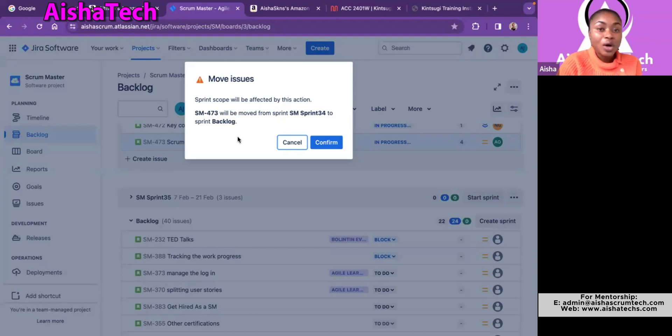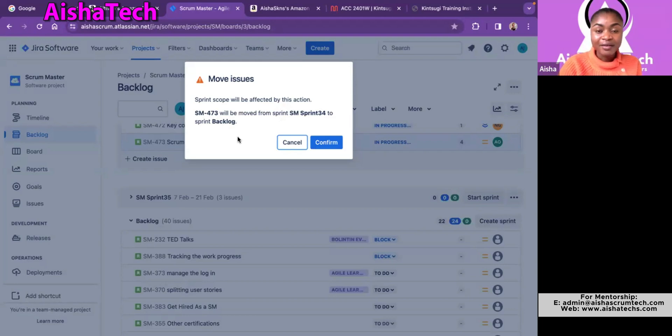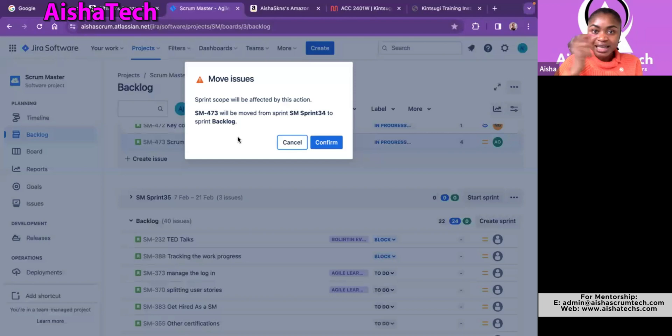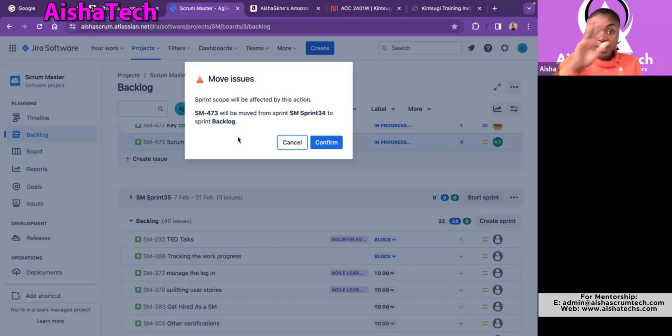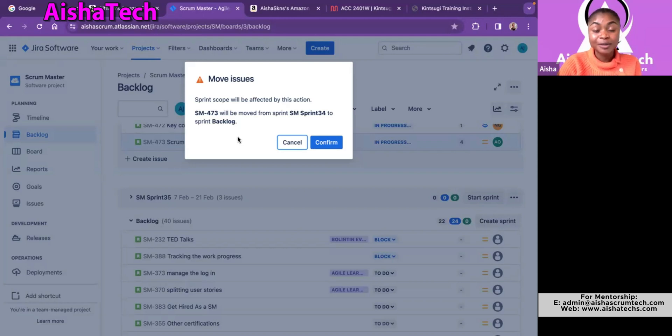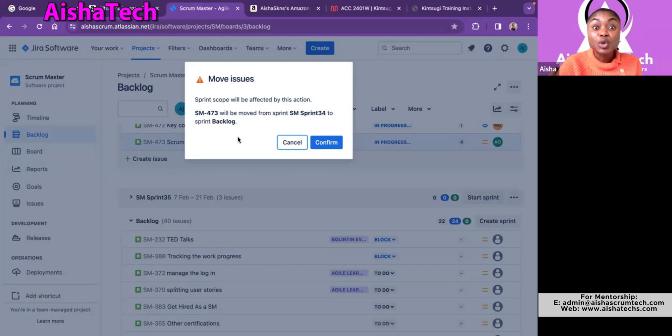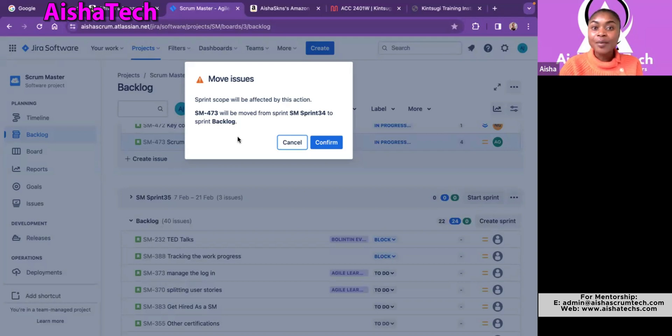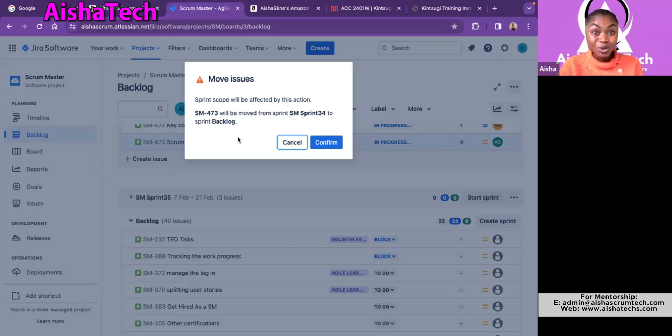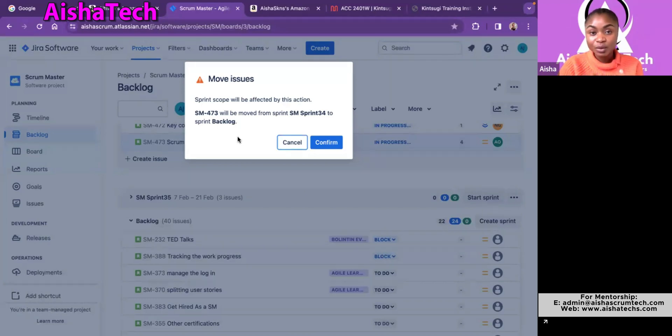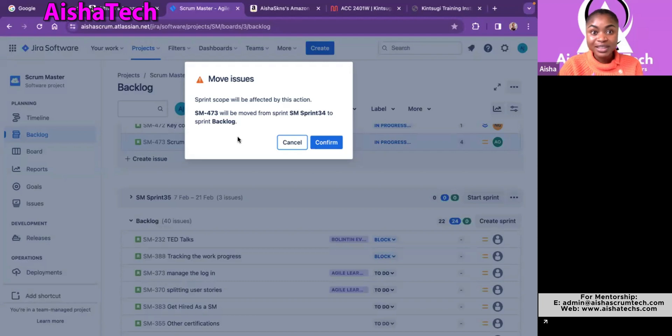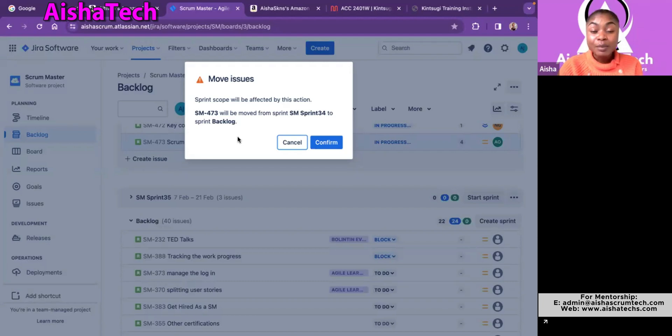Jira going to warn you that you are doing something that's anti-agile. Basically, it's not a good practice. So it says sprint scope will be affected by this action. Jira will give the warning. So this story will be moved to this sprint, to the sprint backlog. That's what I selected. And you will have to confirm as a scrum master. And it's a very good practice for you to coach the team. I'm saying this because I know teams sometimes do not know that if they pull things in and out of the active sprint, it will affect the overall sprint report. It also will affect the sprint. And also it will affect the overall scope of work. So it's your responsibility as a scrum master to coach and educate and tell the team about moving things back and forth.